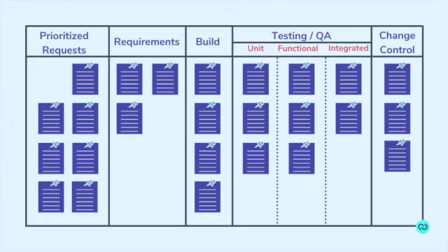So the way that the application of the Kanban board really works is that you are going to take this sequence of events and we're going to make sure that we understand what actions, steps, and time needs to take place within each of the columns. So we need to make sure that what's entering the flow is actually going to be able to exit the flow, ideally at a predictable time. So we're going to have quite a few things in that request column, and there is likely going to be things that are being asked from end users that don't even make it onto that column. So I'm not going to touch on that part right now. We'll use a different process to sort of focus on that part.